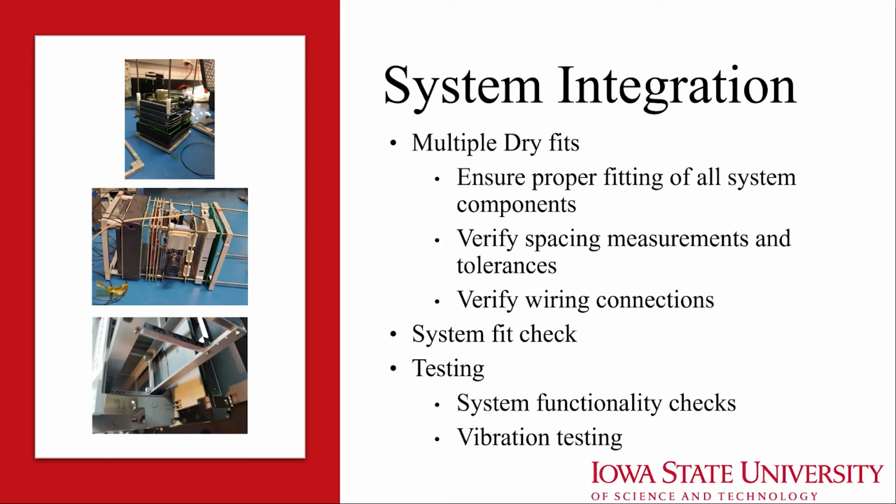Phase 3 would be that power-on test, ending with a mock launch, mock mission, and an alpha software for both the satellite and ground station to be completed in October of 2020. The final phase would be final integration, finishing in January of 2021, which would finish in a vibration test, hardware and software freeze, and handoff.